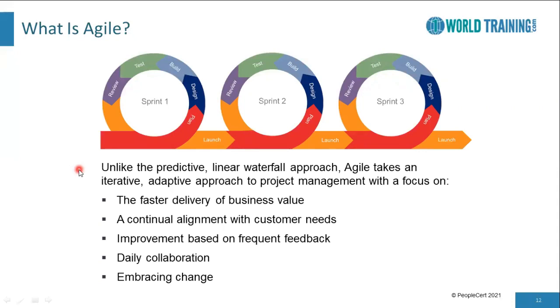Therefore, in the traditional waterfall, it would be sequential or linear, consisting of several discrete phases, such as requirements, design, development, testing, deployment, in an IT context in particular. No phase therefore begins until the prior phase is complete. We cannot return to a previous phase. Therefore, waterfall can have its own challenges.